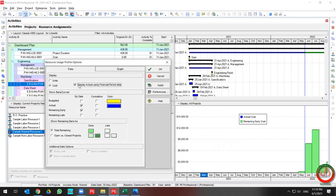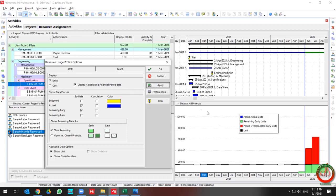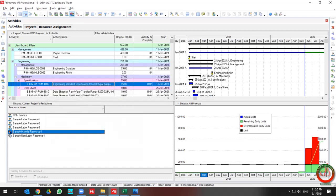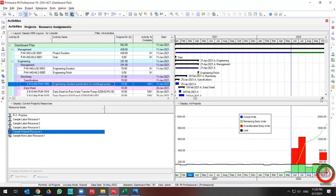Also, the Financial Period option is available here. If you use the Financial Period, all the curves change based on financial period information. You can also choose to display curves based on time interval or cumulative view.